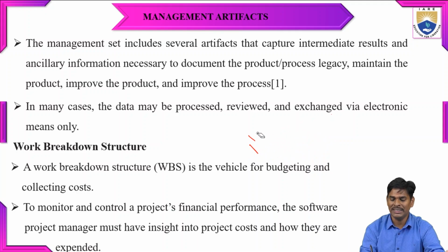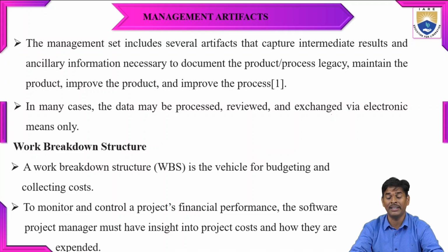Now we'll see that the work breakdown structure is the vehicle for budgeting and collecting the cost. When you divide the complexity of the data into sub-modules, it is very easy to calculate the budget and the actual cost of each and every module, and it is very easy to monitor and control the project's financial performance.